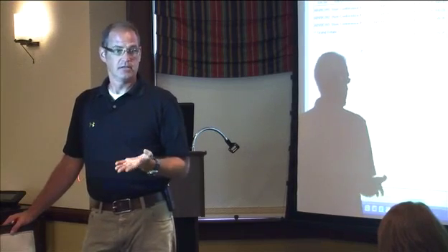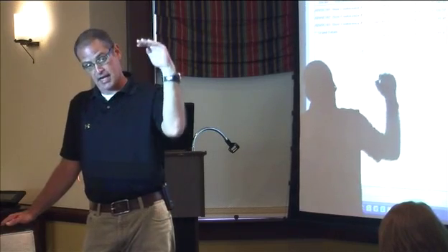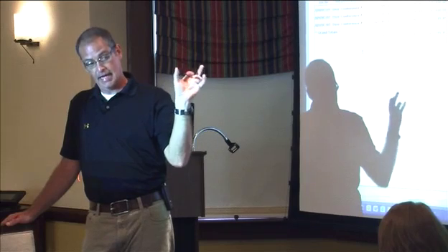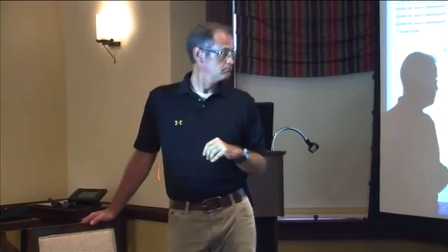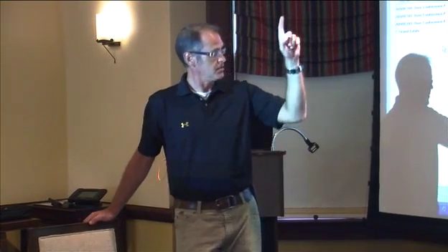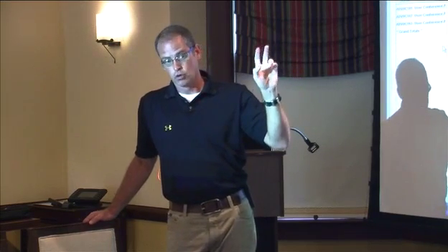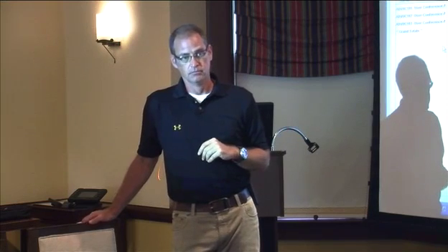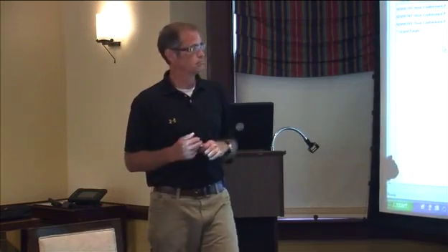If that's the case, then the percentage of completion is actually increased. That would be one of those change orders that you put in with a negative $20,000 on the estimated cost because you're buying down that project, right? Then your percentage of completion goes up, your earned revenue goes up, and your right to bill more on that project goes up as well, as does the profitability on the job. Okay?